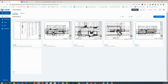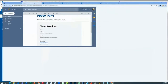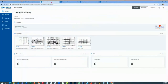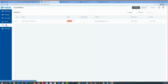Mitch asks: can a free viewer create RFIs? Let's take a look — I don't think you can. Going to the free account... no, can't create. You can respond, but you can't create RFIs as a free viewer.